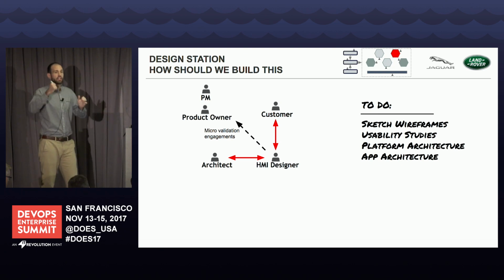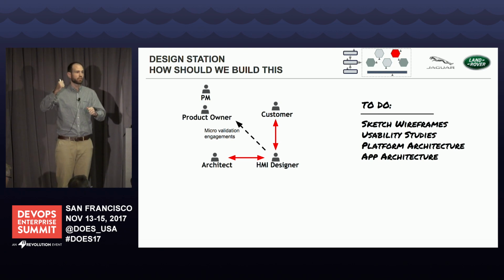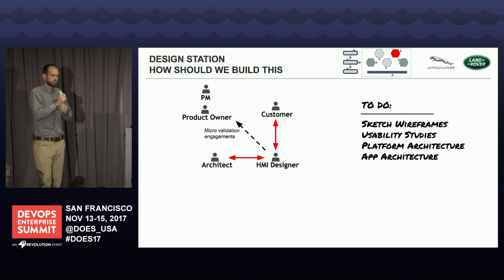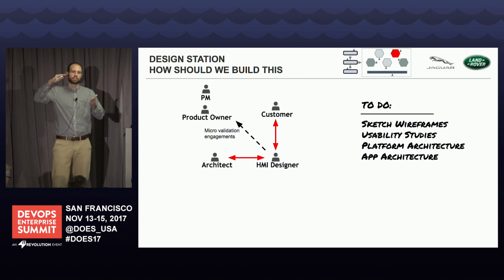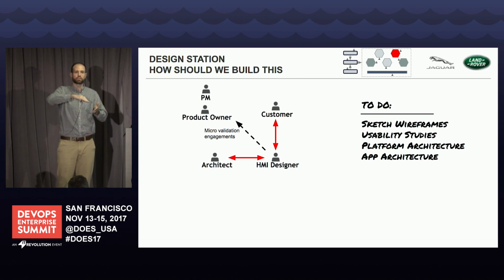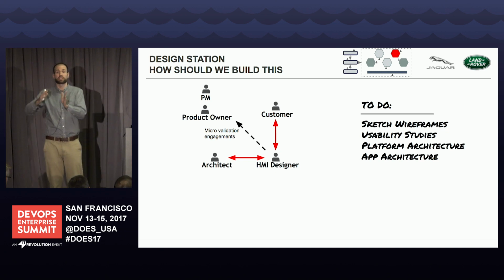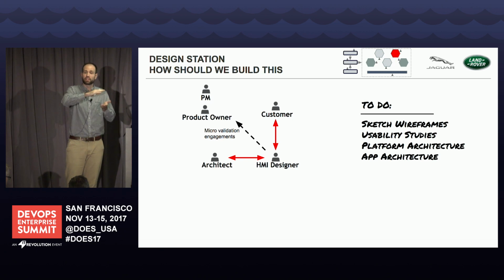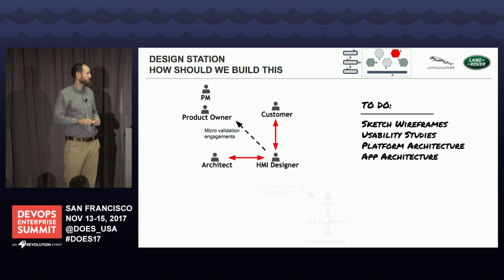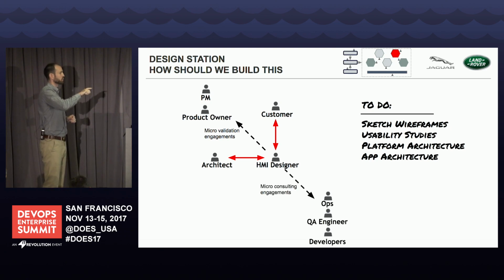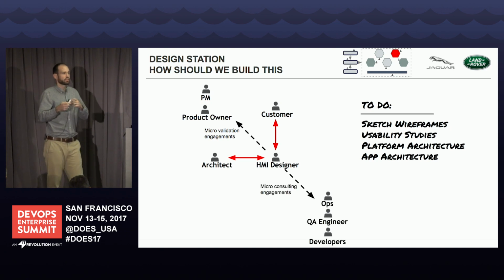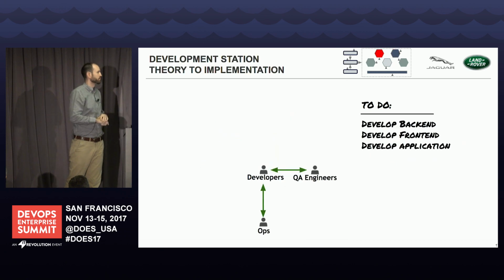Typically, there are now validation engagements that happen that are also interruptions. I find it interesting, one of the UX designers typically has a trail off based off of how much effort they plan to put on a product. When they're finished with their wireframe or they're finished with the majority of iterations and think that they've matured far enough, they are putting capacity, remaining capacity for these interruptions. They're adding it into their workflow, which I thought was really smart. The same consulting engagements exist further on downstream.